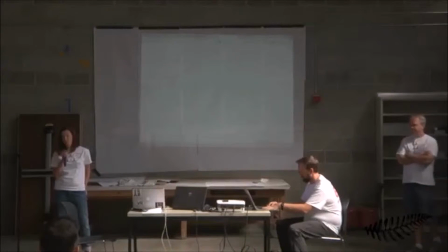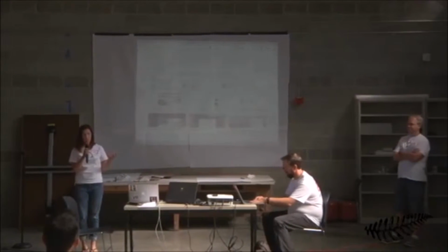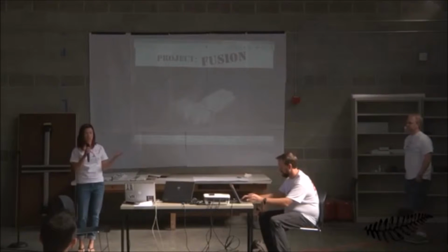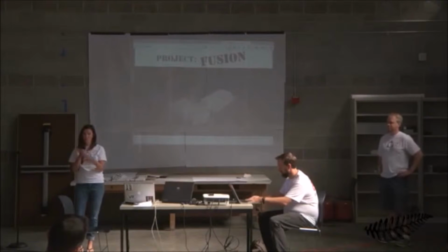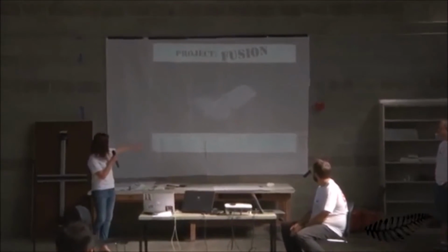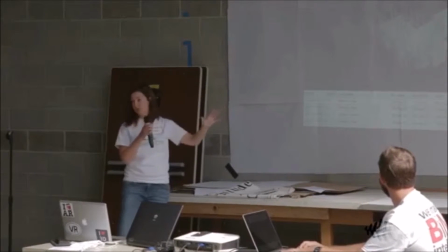As Quentin described, one of the key things that we did here was allow the model viewer to be embeddable, which means that our customers, such as STV, or other software companies, can embed the viewer to connect with any kind of data source that they want. In this case, we chose the data source from Primavera because it's very robust, with a lot of data. It's got tasks with the beginning start date, actual start date, actual finish, budget, etc. So we pulled in the data that we thought would be useful for the prototype.